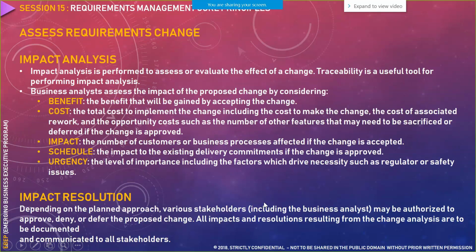Now you would also do impact analysis when it comes to requirement change. That is the only way to get out of assessing requirement change. In impact analysis, you would do all your cost benefit analysis, impact, schedule, urgency, how urgently it is required. All those parameters you would touch base with. What is the benefit associated with this particular change? What are the costs associated with this particular change? How would it impact the other elements of the system? What is the schedule of this particular change? How soon can it be completed? What is the urgency? How soon is it needed? And if there are any impacts, how would they be resolved?